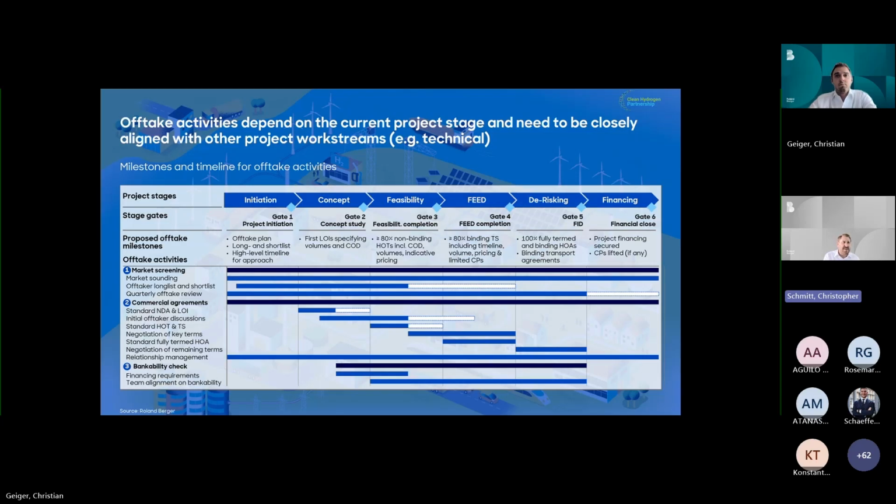And the last point is, we tend to see a lot of projects which take the technical dimension as the leading and dominant dimension, and they design the stage gates accordingly. And this is normal. You have a pre-feasibility study, a feasibility study, the FEED, etc., and those are the milestones against which the project is managed.